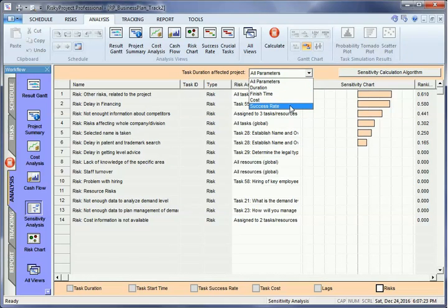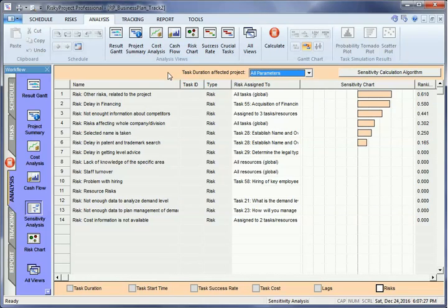This tornado diagram will show you crucial tasks, the combination of which will most noticeably affect the duration of your project.